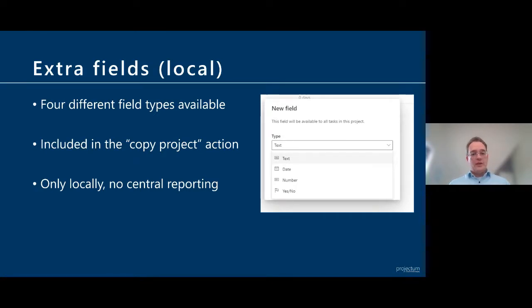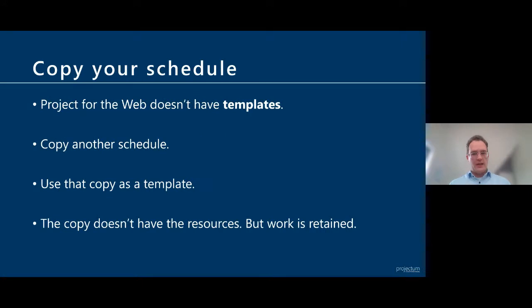We're also going to look into copying a schedule. Project for the Web doesn't have templates, but you have the option to actually copy that schedule and use that copied project as a template. So it's kind of tricking the system into templating.